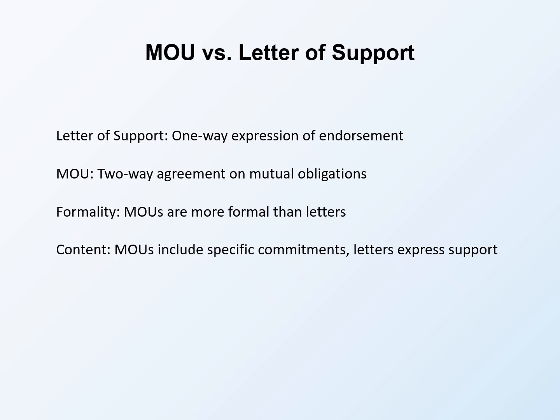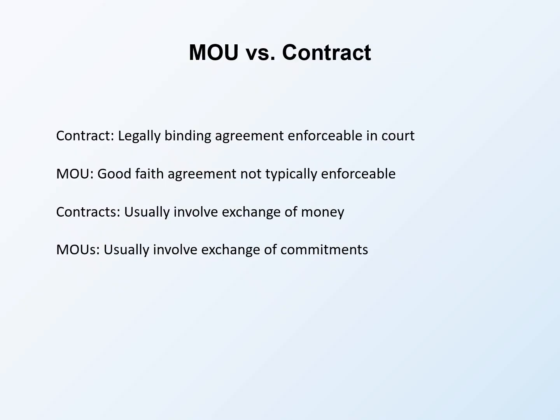Mutual responsibilities identify things both partners will do together. Joint planning sessions, shared decision-making on certain matters, and collaborative problem-solving are examples. Clarify what collaboration means in practical terms. Resource specifications detail the resources each party contributes. Staff time, facilities, equipment, funding, and expertise should all be quantified where possible. Partner A will provide a project coordinator at 50% time for 12 months is clearer than Partner A will provide staff support.